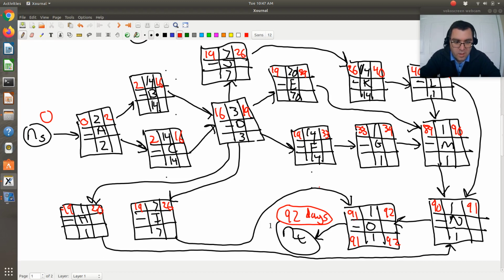Okay, and then, where do we, let's follow this madness, if you will. It's a little more complicated because of the way I've drawn this path. So that's O. Okay, so then working backwards, going into O is going to be I and N. So now going backwards, I needs to be completed before O can start, right?